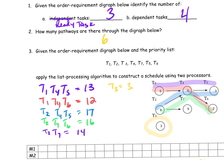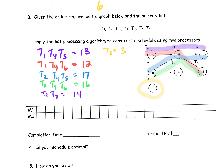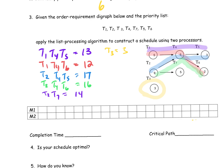Now I'm going to schedule this. This is my priority list right here. I'm going to schedule Task 1, Task 2, Task 3, Task 4, then Task 7, then Task 5, then Task 6. I'm going to put this project on the schedule — I've got two processors. So I'm going to put Task 1 on here first. Its completion time is 5, so that takes me out to 5.